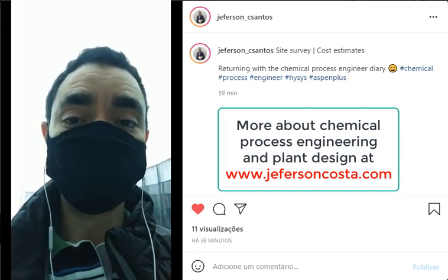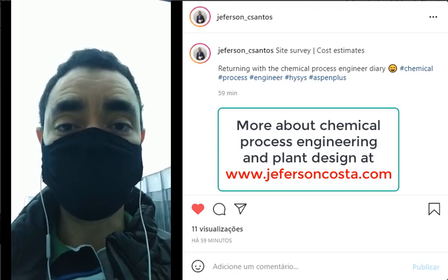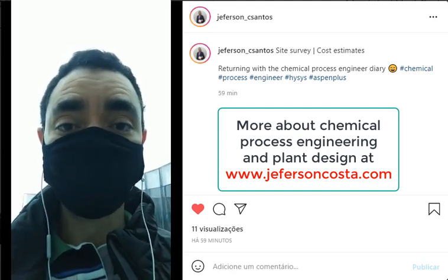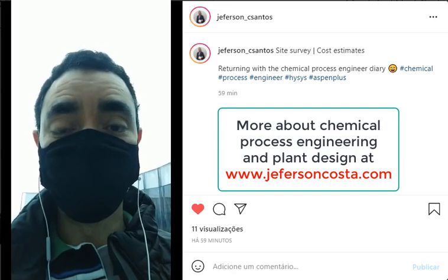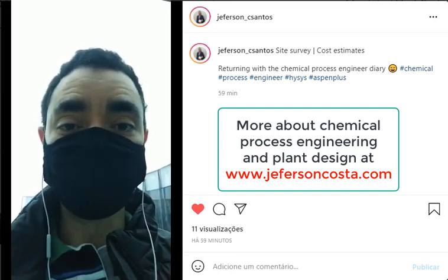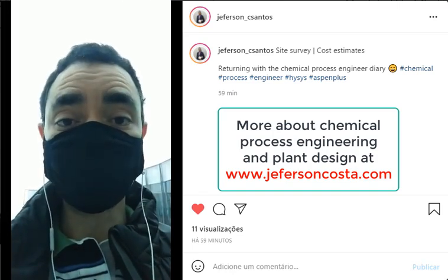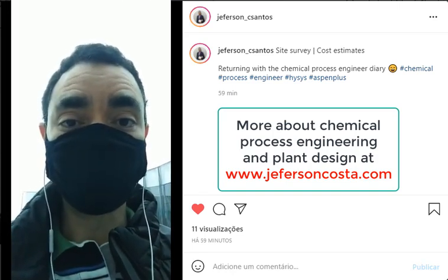For instance, in conceptual design, most often companies accept a variation of minus 15% to plus 40% in the values estimated at the conceptual design.